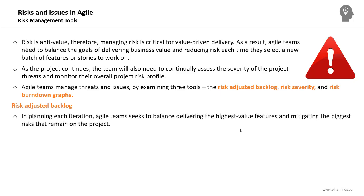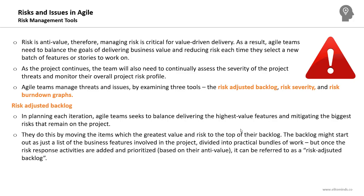Before talking about the risk-adjusted backlog, the product backlog is a document where the product owner lists all the features the agile team should develop, prioritized based on anticipated value. In planning each iteration, agile teams seek to balance delivering the highest value features and mitigating the biggest risks that remain on the project. They do this by moving items with the greatest value and risk to the top of their backlog.